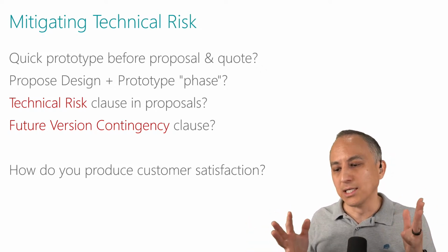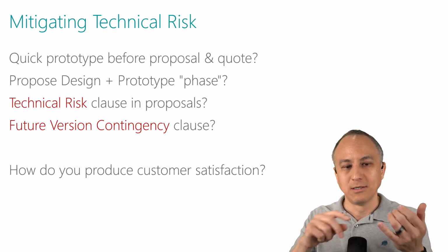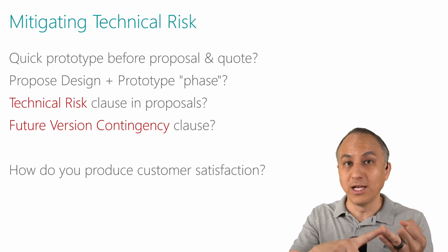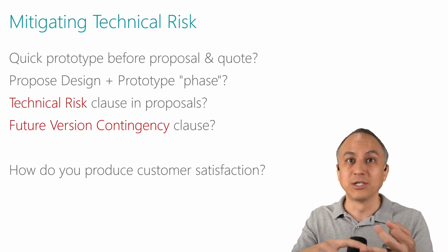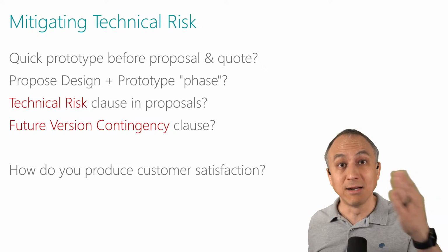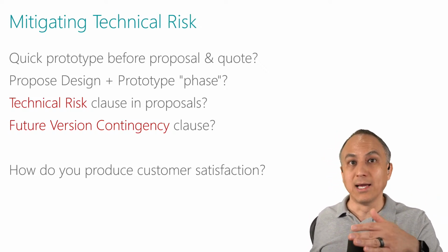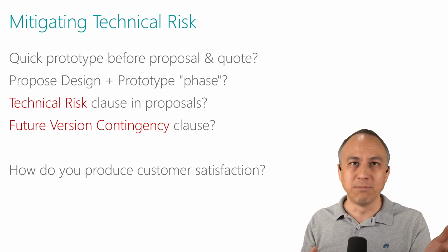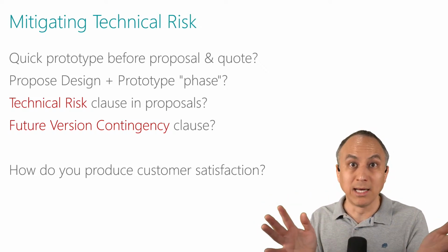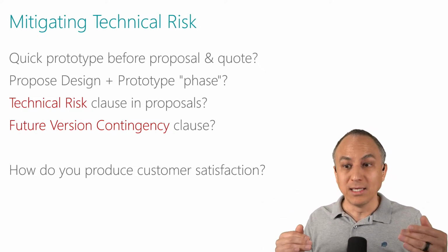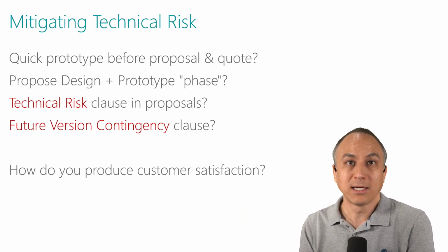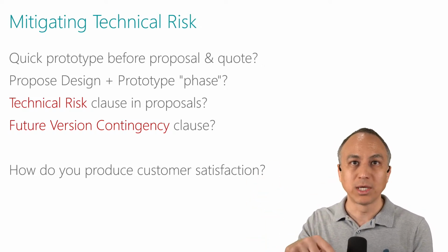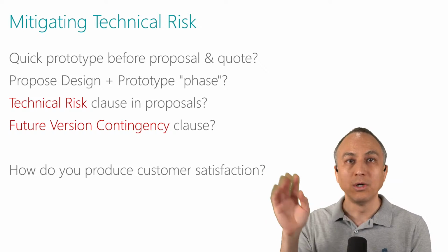I'm proposing the customer plan B. Use a different integration tool, use a different integration point in Business Central, such as web services instead of web API. And you could criticize that choice as well. Say, nope, that's a bad choice for these reasons. I get it. And then the fallback is configuration packages. Export your data as CSV, pop it into a configuration package, do it manually.